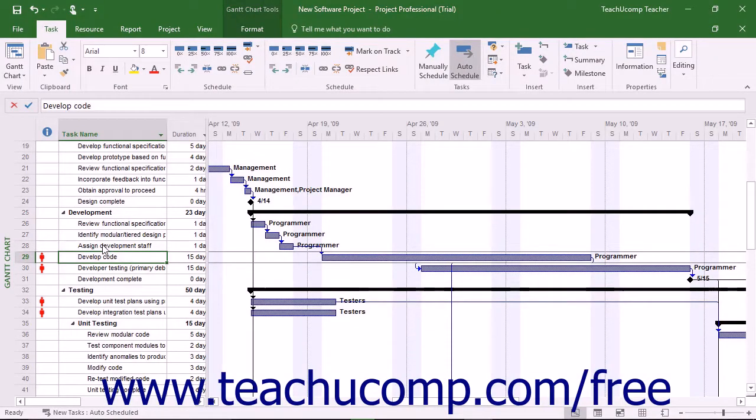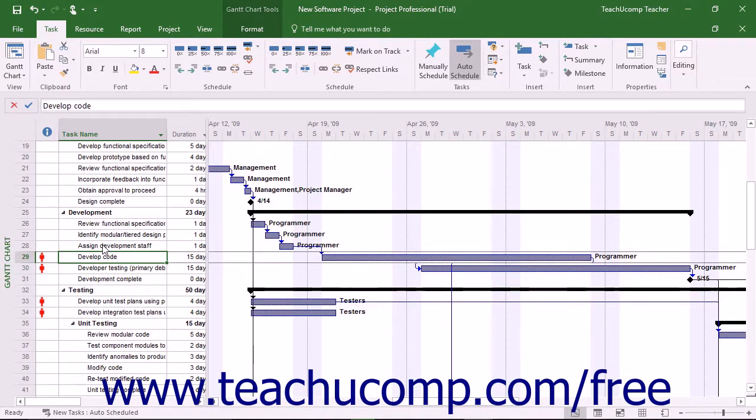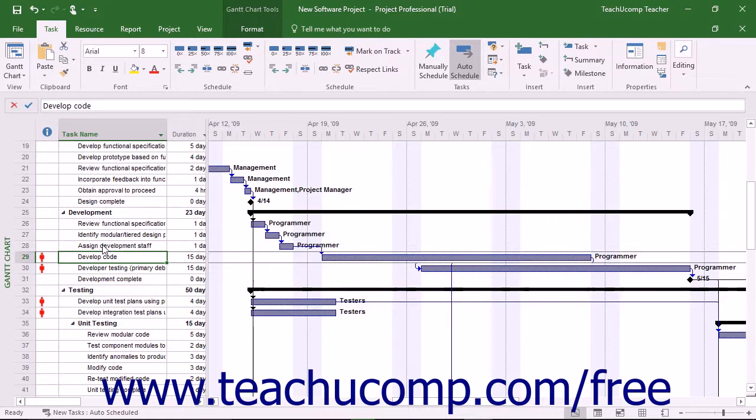For many project types you can create work resources that fit a general type of work. For example, within a software development project file, a programmer work resource could be used as a general type of work resource. Now assume that the first week of the project you will have one programmer, then two programmers for the second week, and finally three programmers for the remainder of the project.